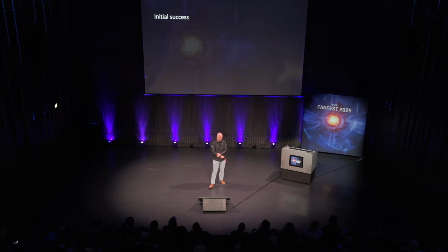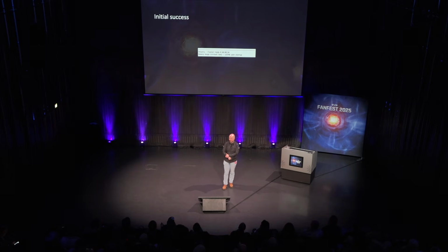So, to our own surprise, this plan worked out better than expected. Reckon Digital was done with the Python code conversion after like 2 months or so, and then we were behind a bit on the C++ front at that point in time, so there were a lot of small successes. And eventually, this was a bit later than the initial plan that I just showed you said. This was November 1st.